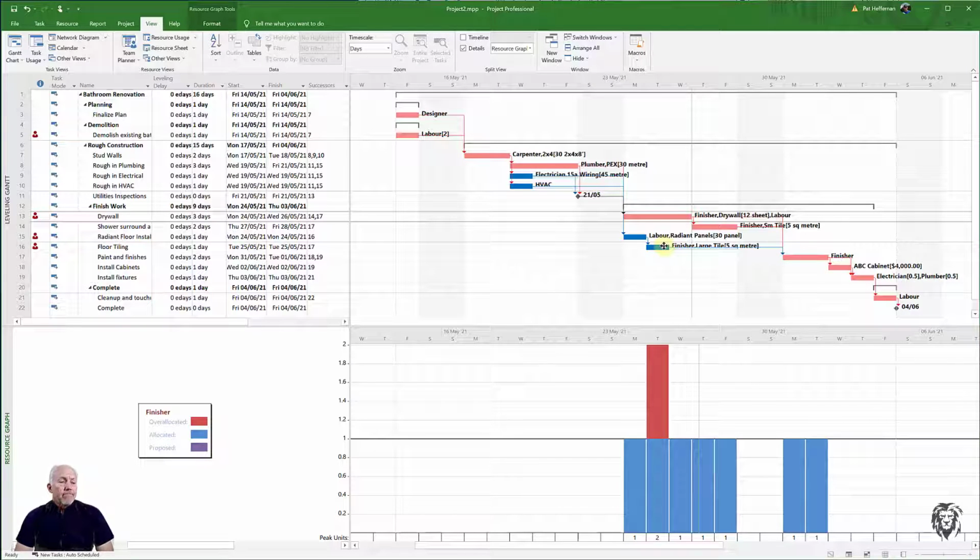So may as well try to figure that out. So the normal way, once you've figured out that your task is actually planned to be executed the way it should be, and you're not going to fiddle internally within the task resources, work, duration relationship, your only real option, and the way we normally deal with leveling resources, is to delay one or more tasks until the resources are available to work on those tasks, right? So we're just trying to shift it.